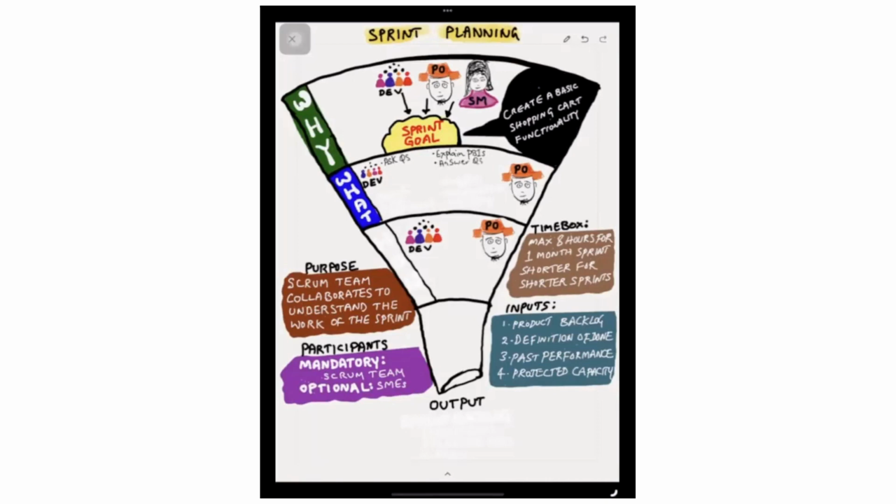In general, these items were already discussed in the previous sprint backlog refinement. Most of the items, 80 to 90% clear, and they were estimated also. But in case some clarifications pending in the previous sprint backlog refinement, they can still ask in the sprint planning. And then once the developers are clear, they will see any estimation or re-estimation is required for those items.